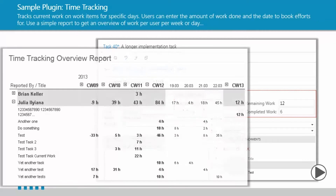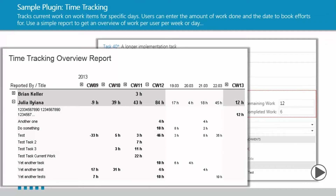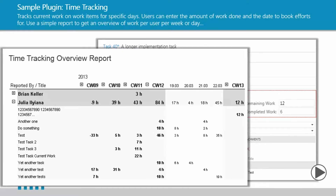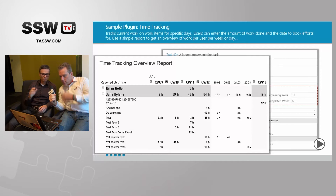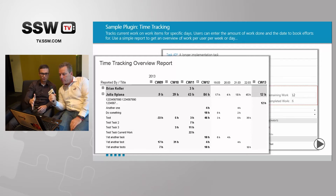In the background, reporting will show that those four hours were booked to, say, the 8th of November. You can easily create a report — they'll deliver an RDL file — to track on a weekly basis which person did which hours on what tasks. Everything is also populated to the cube, so you'll see those numbers in Excel if you connect to the cube.